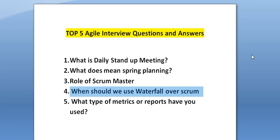The next question is: why should we choose waterfall over scrum? If the requirements are simple, predictable, fully defined, well understood, and will not change in the future, then you should go with waterfall over scrum. Because it is very simple, there is no dynamic change, and requirements are constant. If you have a very clear idea about your requirements and they are fully defined and understood, then you should choose waterfall.